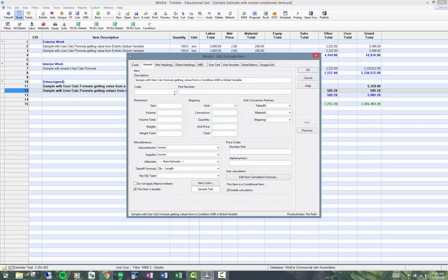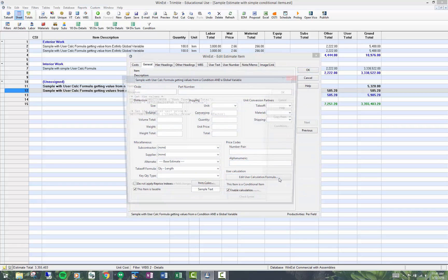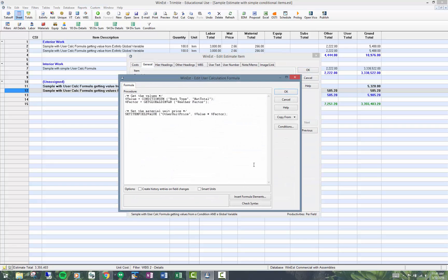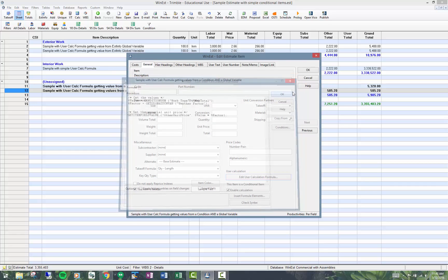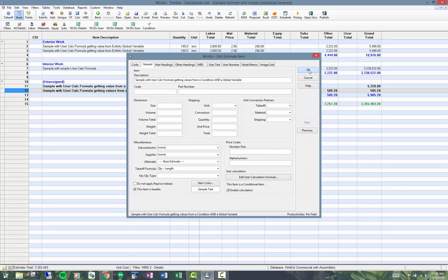Let me show you the user calculation formula. I'm getting the value again, the material total from that work type condition I set up. I'll show you the condition in a second. I'm also getting a factor, that's get global dimensional variable called weather factor. Then I'm doing the math in here. I'm setting the item's field value for the other unit price, basing that on a value here times the factor. I click okay.